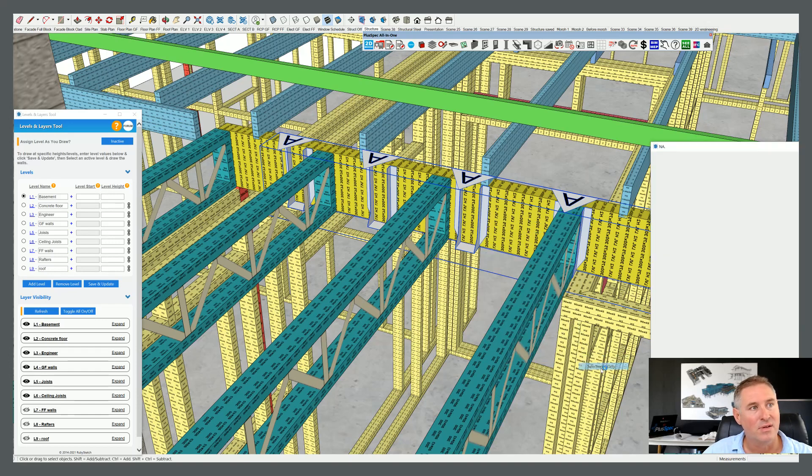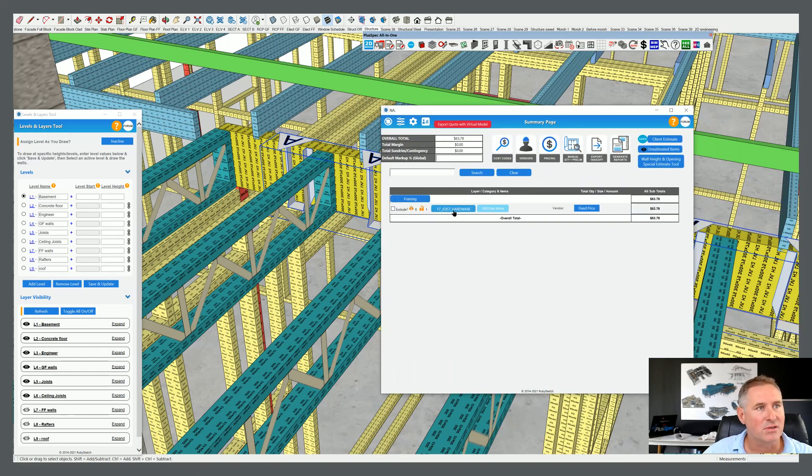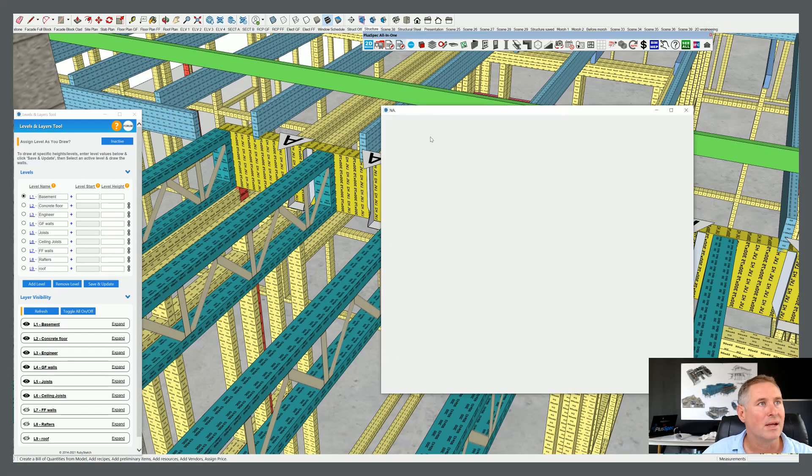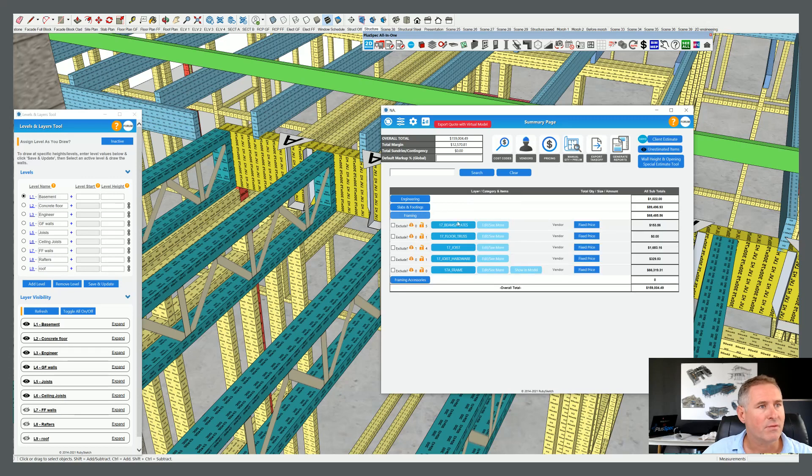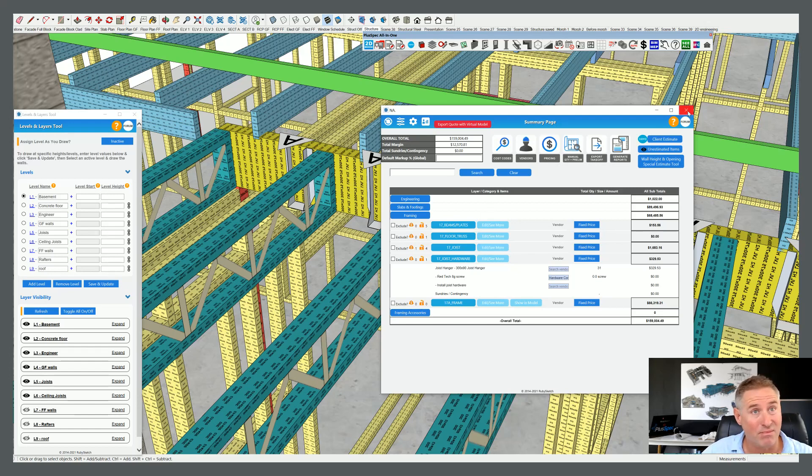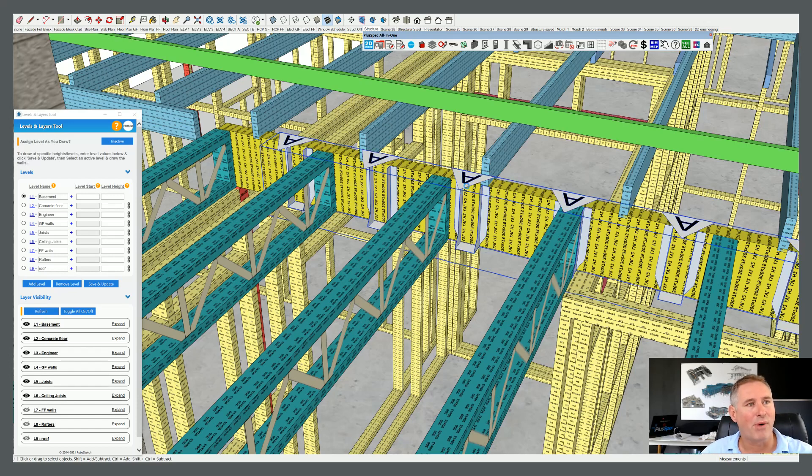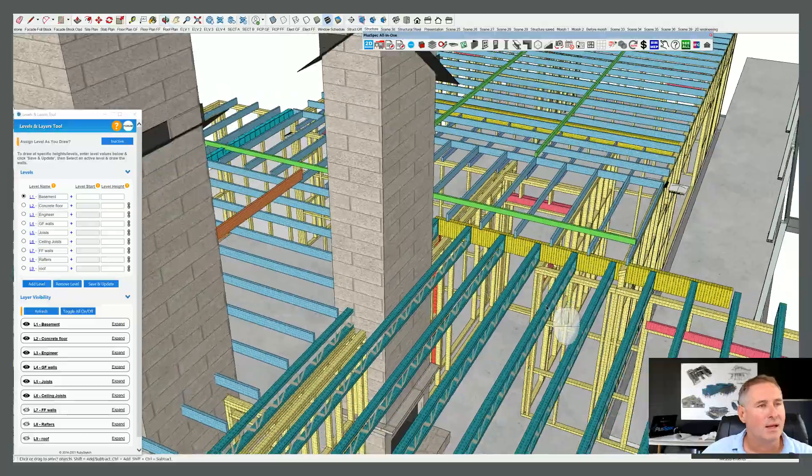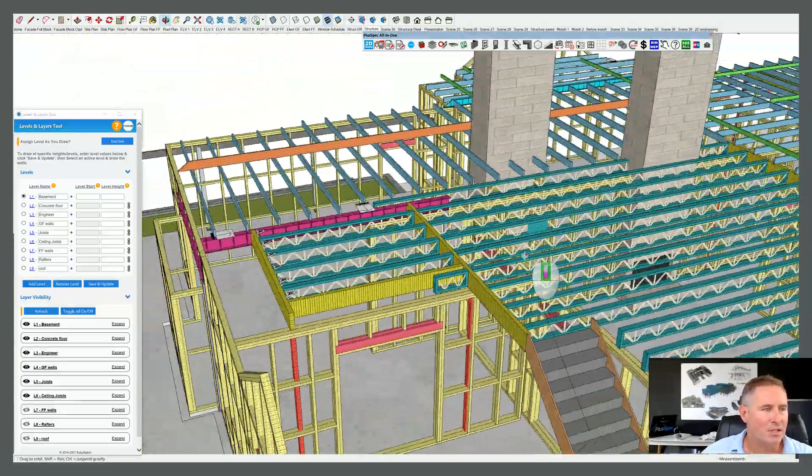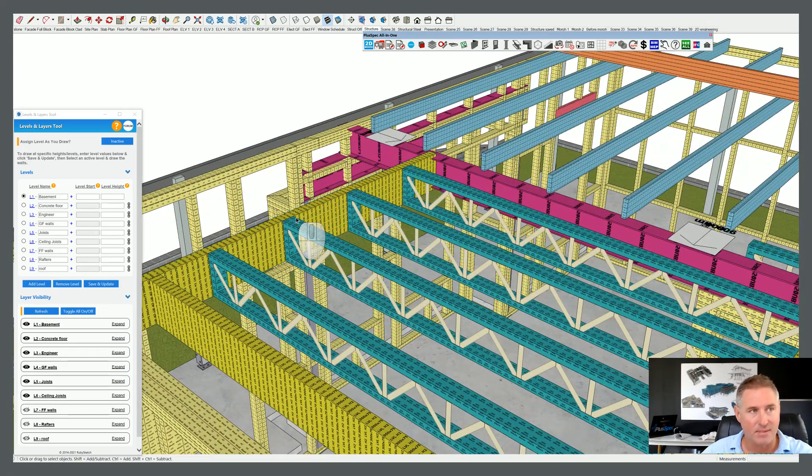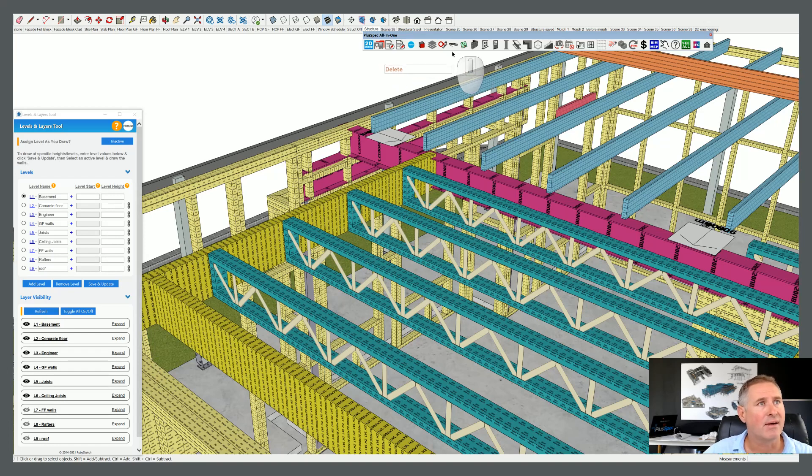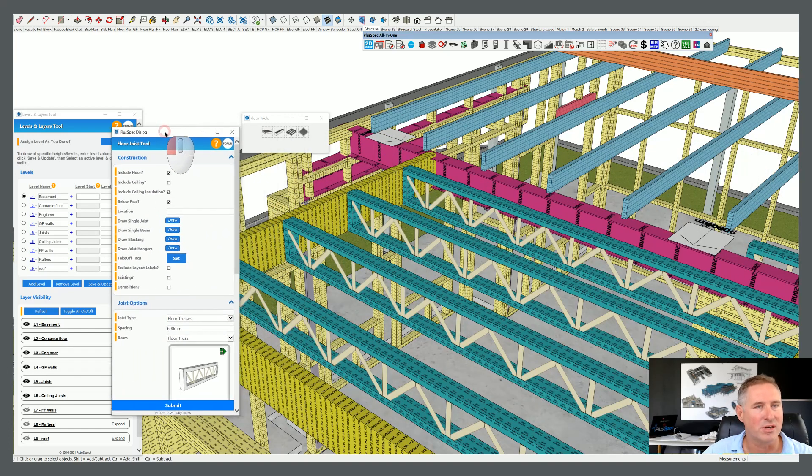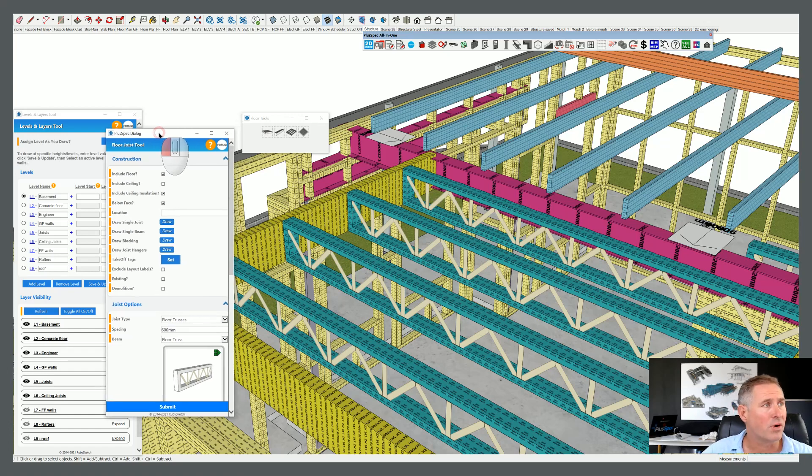I need to delete these joist hangers. If I just went right click here quickly and just took this off a quick takeoff and bring this in, it's only going to take off these joist hangers. Joist hardware, you'll notice I have six hangers in there. If I did a takeoff of the whole lot quickly, framing joist hardware, 31 at the moment. I've deleted a few out and it's not ideal, but I find it really frustrating if you look in my shed at home when I was building, I've got so many brackets and things left over. I quickly deleted that, I'll turn my mouse on. I'm going to go through, I'm going to add in some more joist hangers and I'm going to delete these joist hangers out of here that are the old spacing.